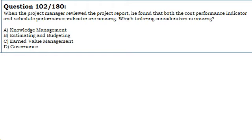When the project manager reviewed the project report, he found that both the cost performance indicator and schedule performance indicator are missing. Which tailoring consideration is missing?